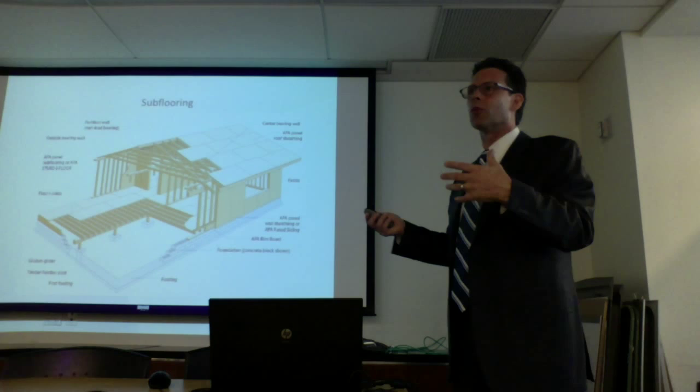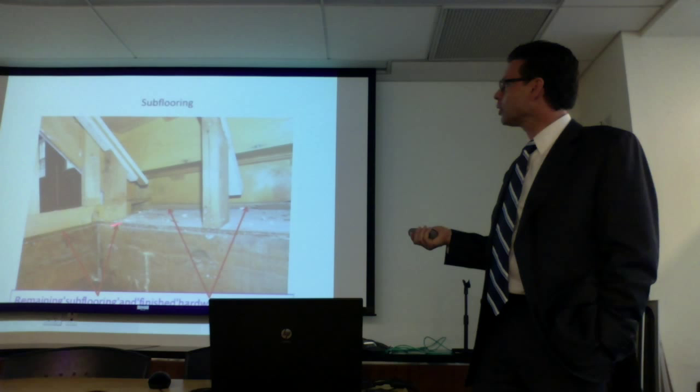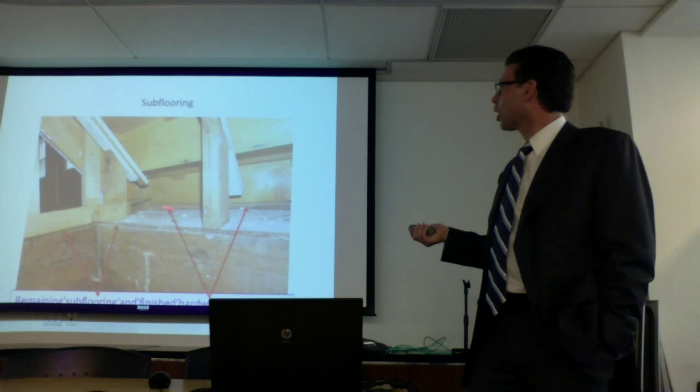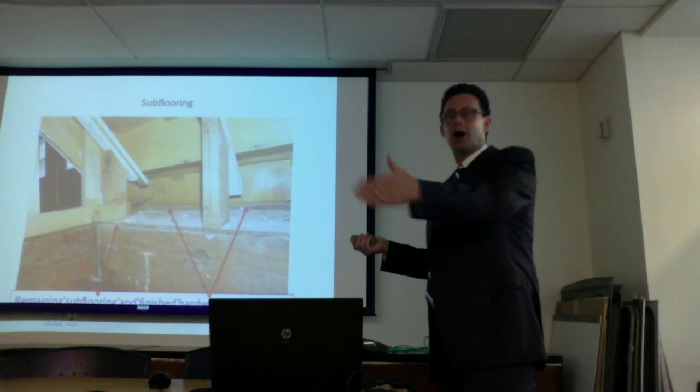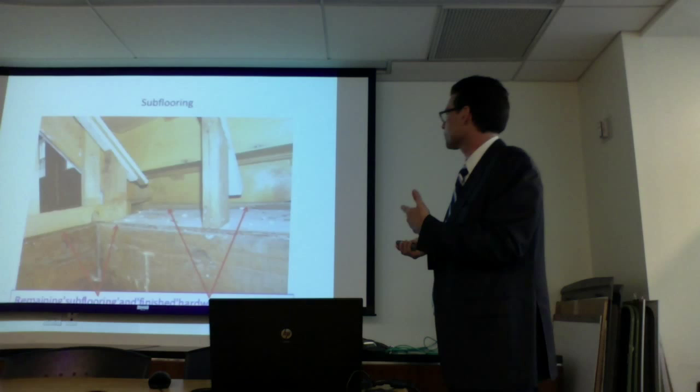So this is a subflooring situation post water loss, and you can see here, this is the staircase. Not only is the subfloor under the staircase and under the wall framing, the original hardwood floor is still under the staircase. So the remediation guys took the subfloor out up to the staircase, and nobody took it out under the floor. So I have to take the staircase apart. In this case, we have to replace the staircase, but I have to replace the subfloor under these walls and under the stairs.